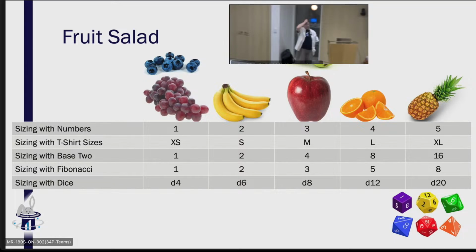I did this activity with a team where we did exactly this with what was supposed to be 3 months worth of work. We had each product backlog item written on a board, and we started putting them up on the boards. These were the 1s, these were the 2s, these were the 3s. And then they started to go, well, no, these are easier, so we created a 1, zeros. Then we created a 1.5. Then we created 2.5. And we ended up with, I think, 13 different buckets for this. 13 buckets. There was something like 80 items in the backlog that we were going to do. It was huge. We ended up with 13 buckets.